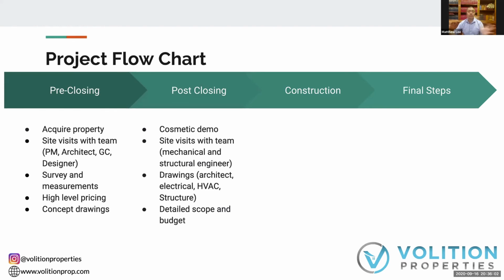Those things will drastically change the costs of your materials. So it's not until you're into the project, at least 3 or 4 months, that you can start to get a very good sense as to the cost of the project.